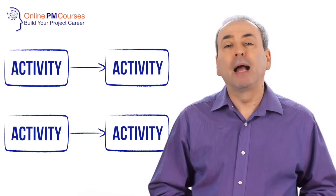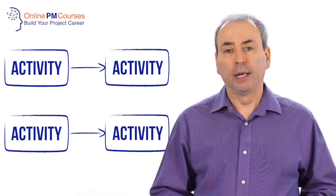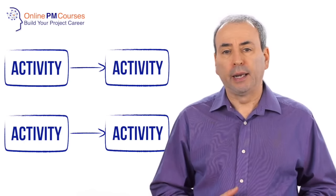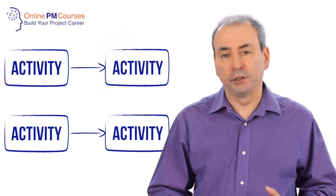Note, however, that if you have parallel paths through the network, you can only make this work if you have the resource flexibility to ensure that resources are deployed according to your plan.